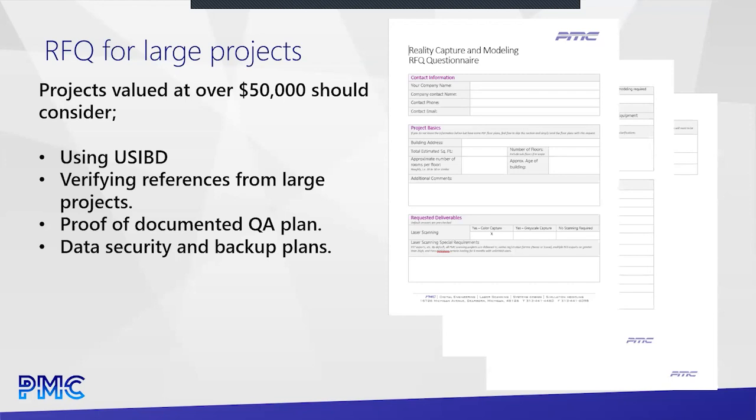Real quick from our point of view, right? Our guys go out in the field and they capture data every night when they get back to the hotel. They have to take it, it's an SD card in the scanners or a hard drive in the mobile units. That data has to be archived twice every night. So it goes to their computer, a copy gets saved on their laptop, a copy gets saved on a USB drive, and then the laptop and the USB drive can never be kept in the same piece of luggage, right? And so there's a whole process we have to make sure that we never lose that data, right?